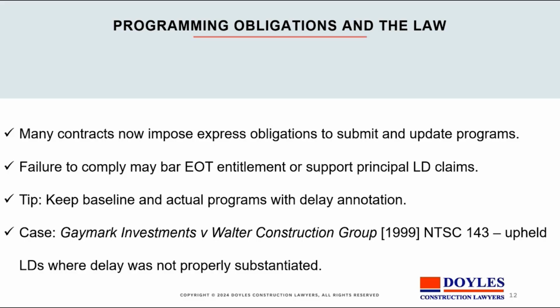So there's a lot of complexity in keeping up to date with the programming requirements and having the superintendent approve those programs regularly. Again, if they're not agreed, the extensions of time are not agreed, then they'll have to be properly notified and perhaps reserved for dispute at a later stage.